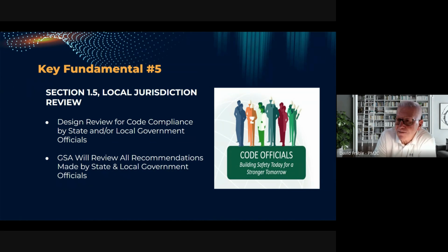From a fire protection perspective, this is important because a local jurisdiction may have some unique fire protection requirements that may need to be incorporated into a project design. For example, a local jurisdiction may have a specific type of fire pump or standpipe hose outlet connection and have specific requirements for those connections. Therefore, it is important that the regional project management team provides the local jurisdiction the opportunity to review the subject project.